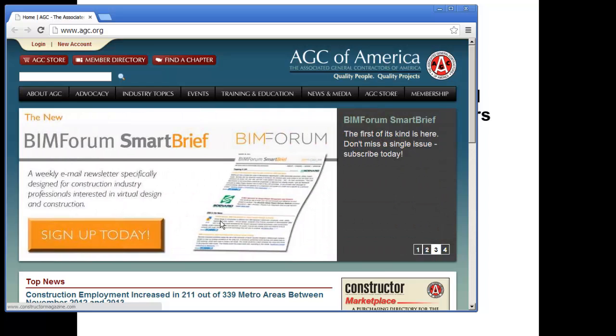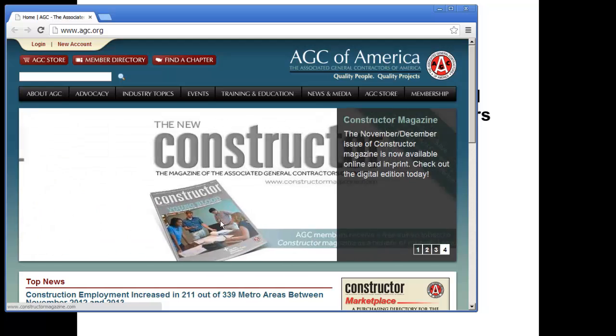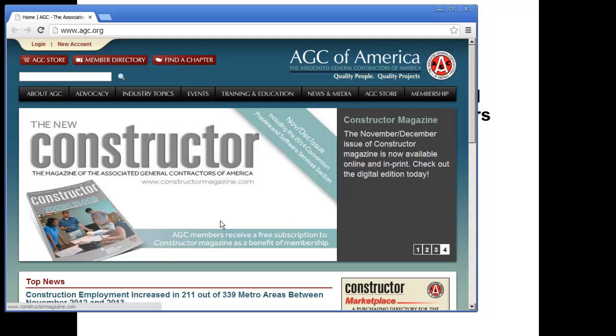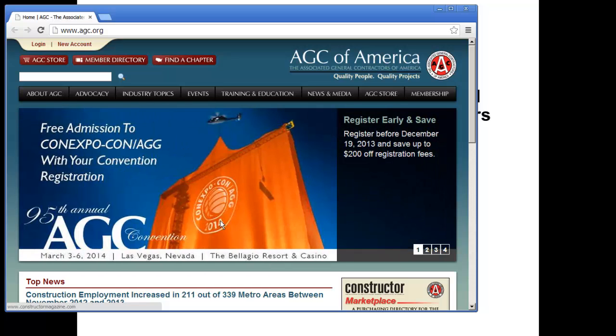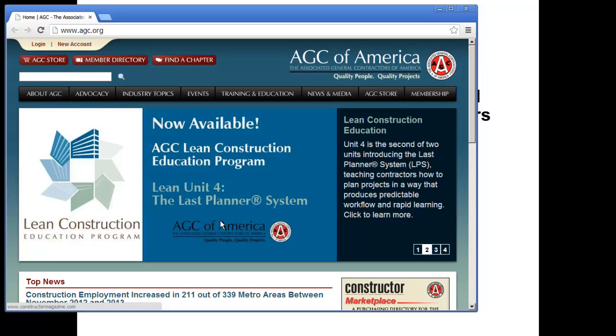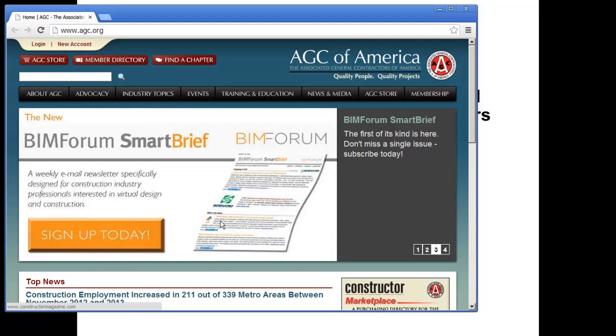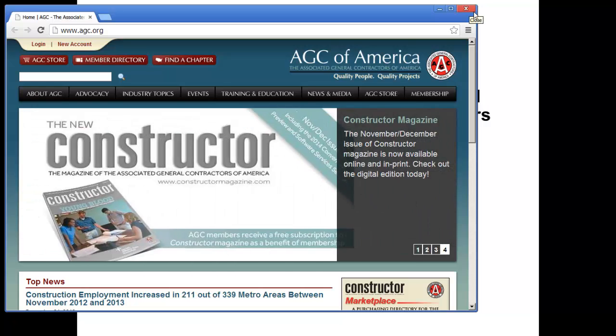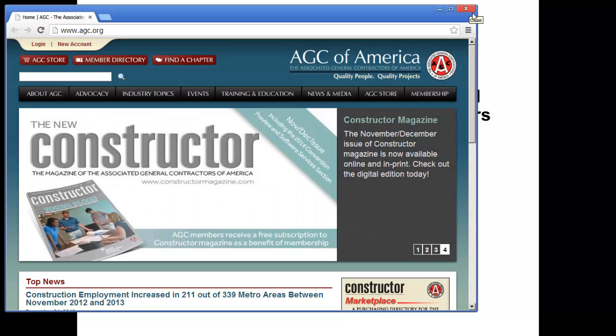And I think what you'll find when you look at each of these different outfits, these different groups, is that the forms are generally written in such a way that it puts the least amount of liability on the person putting out the forms. AIA forms rarely give the architect any major responsibility cost-wise on any problems in the job. As with the AGC, I'm sure it kind of leans towards not giving the contractor as much financial responsibility for errors and omissions that come up within the drawings and the specifications and the construction itself.